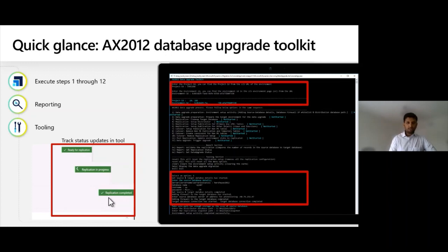Once the LCS project is authenticated, you will be opening up the IP for your AX2012 environment replication to work with your self-service environment. Once the IP is allowed to interact with each other, then you will actually start the replication process. And during the replication process, a one-time copy of your total AX2012 environment will be copied over to the D365 self-service environment as a snapshot.